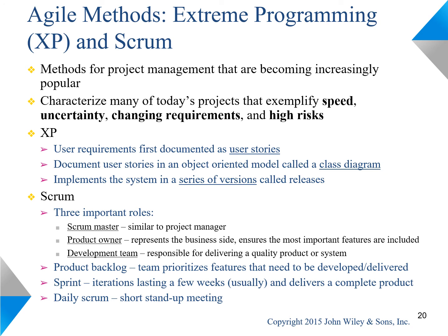Requirements or features are defined by the product owner, and time estimates for each feature are estimated by the entire team. The product owner then prioritizes the features that become the product backlog, which is subsequently divided into iterations called sprints.